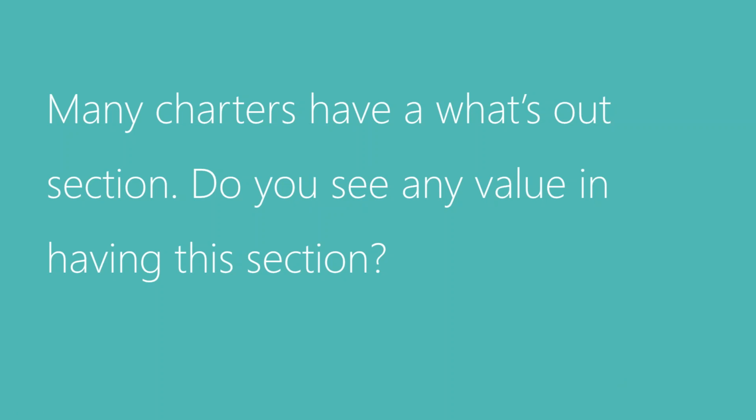And again, if it's out of scope, test that assumption. Is this still out of scope? In a team meeting, I would select a couple areas to review each team meeting. Well, let's test these assumptions. Let's test this risk. Let's have a conversation about quality. Do these still feel right? Are they still good?